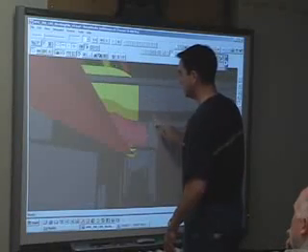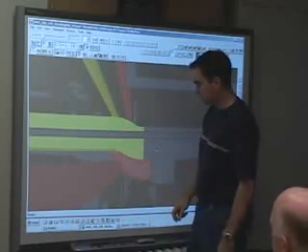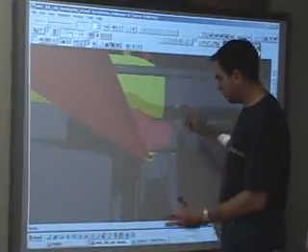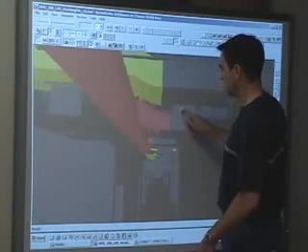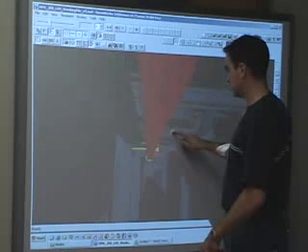Well, one of the things that's really been changing in the industry is what we call BIM, Building Information Modeling, also called Integrated Design or Delivery. And what that really refers to is how we're using a building model beyond just design. Now it's also being carried from the earliest part of the design process all the way through into construction. So what we're able to do is really meet with the contractor and subcontractors and review a digital version of the project before it's actually built. And what that does is it really reduces the number of questions that we have, the number of RFIs that we have, the number of conflicts and problems that we have out in the field.